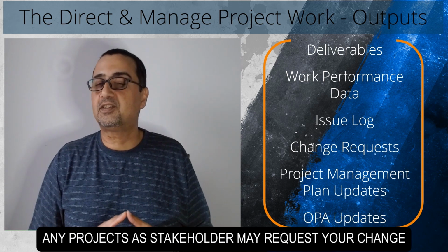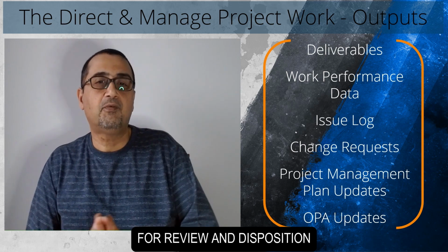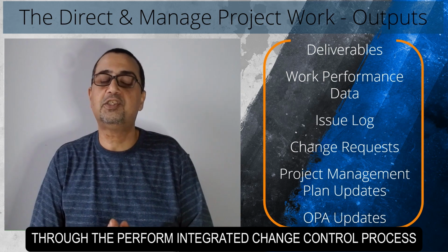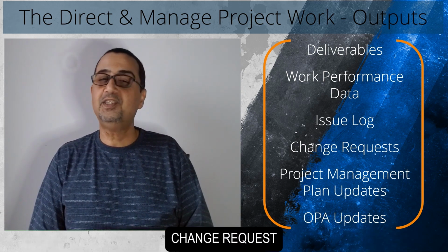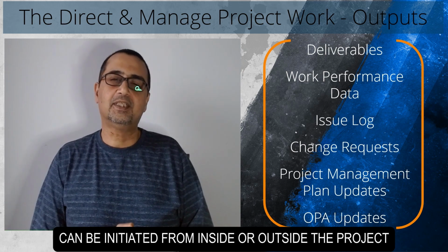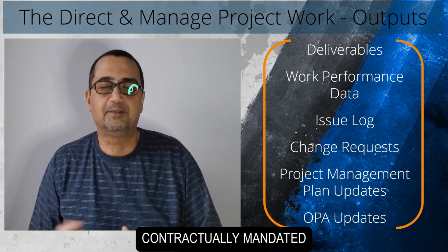Any project's stakeholder may request a change. Change requests are processed for review and disposition through the Perform Integrated Change Control process. Change requests can be initiated from inside or outside the project, and they can be optional or legally or contractually mandated.